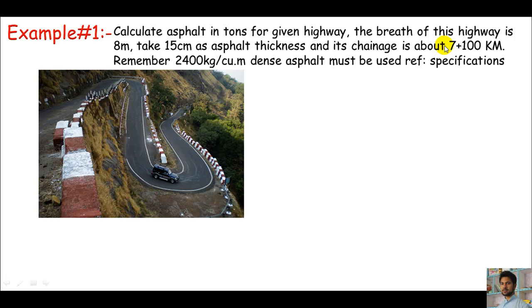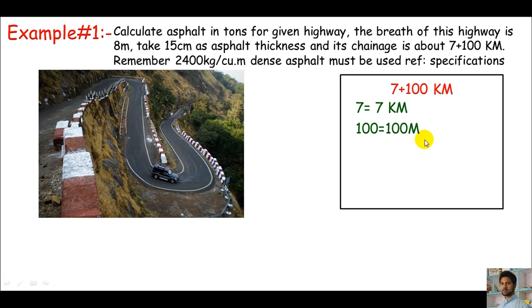One thing is challenging: the chainage of this road which is 7+100 kilometers. What does it mean? If you are a land surveyor you must know. If you are a quantity surveyor you must learn this from land surveyors. Here 7+100, the 7 is 7 kilometers and 100 is 100 meters. When the chainage is in miles, 7 will represent 7 miles and 100 will represent 100 feet.